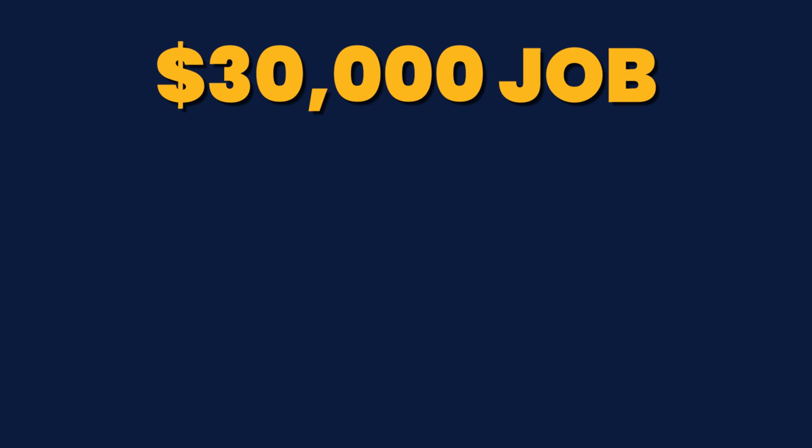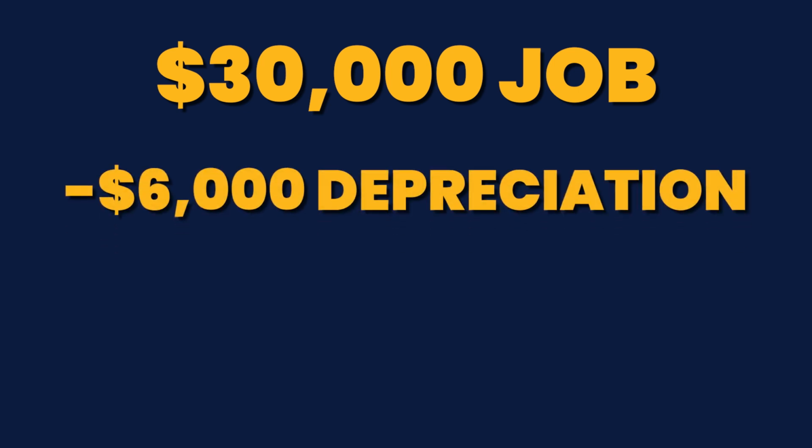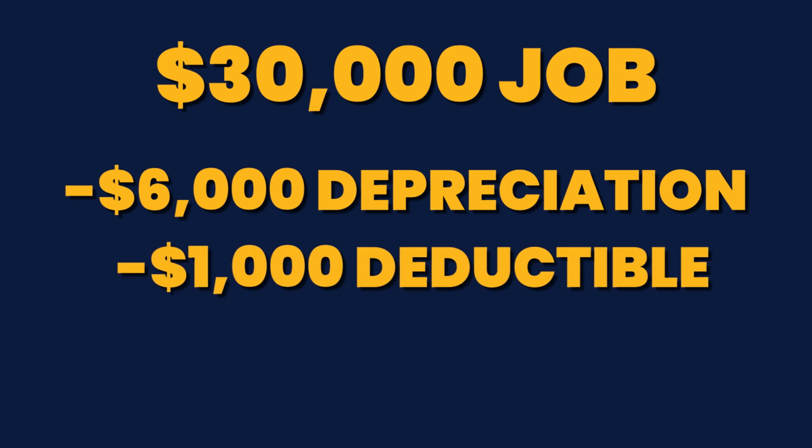Here's what we would tell you. We would take the entire check. So if it was a $30,000 job and let's say $6,000 was going to be on depreciation, right? And there was going to be a $1,000 deductible or whatever. What's that going to be? 30 minus 6, and minus the deductible, so that's going to be 23 grand. We would take that entire 23 grand up front right now today. Does that make sense? We didn't do draw schedules. We took all 23.